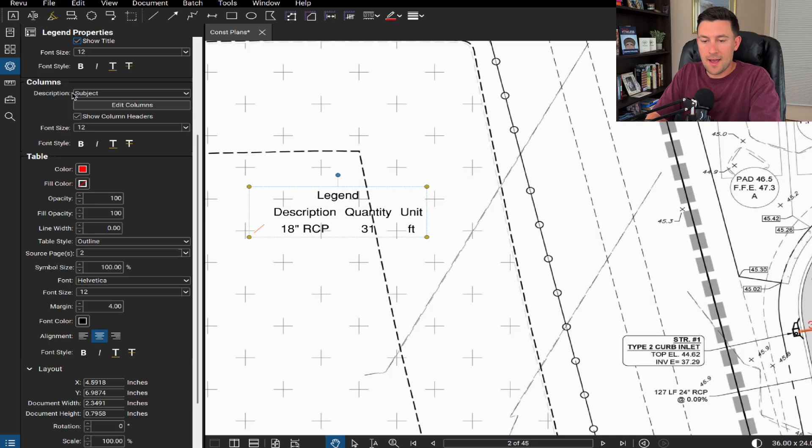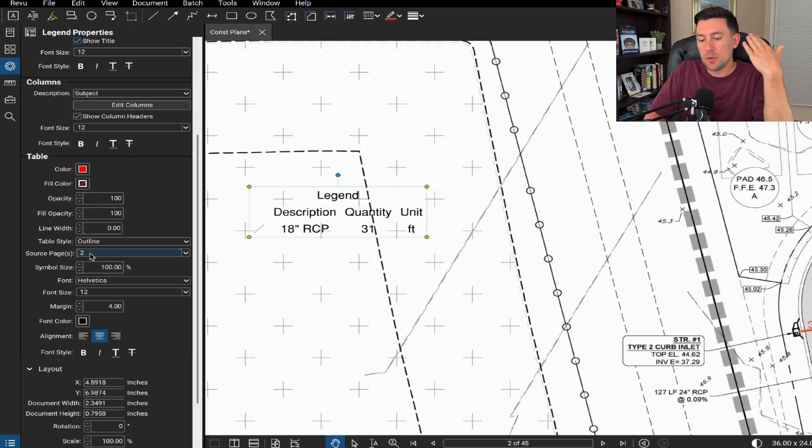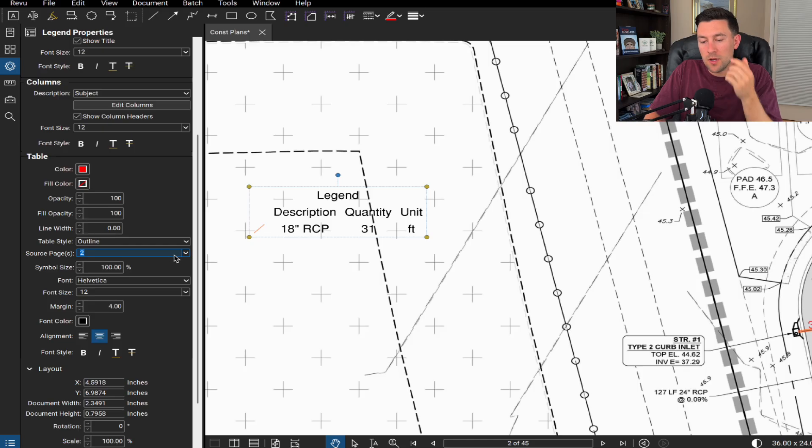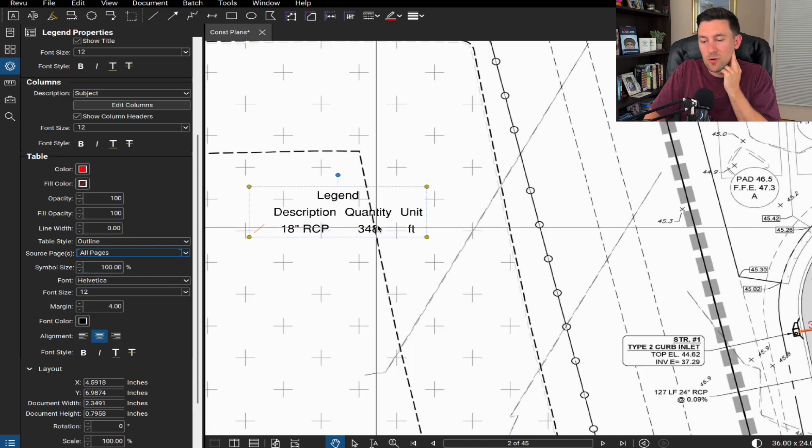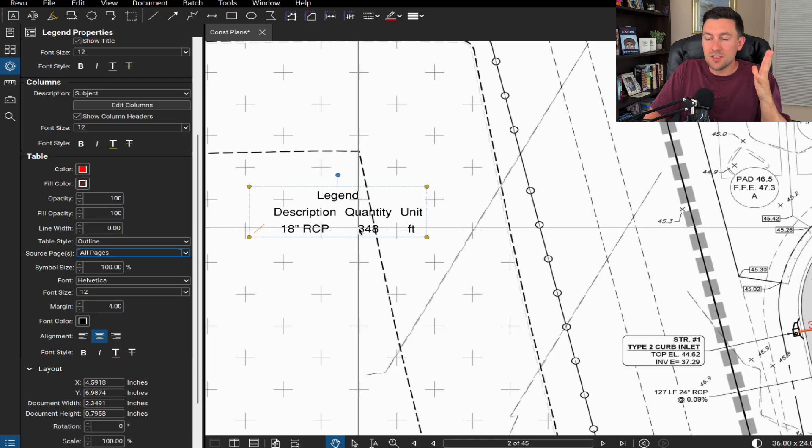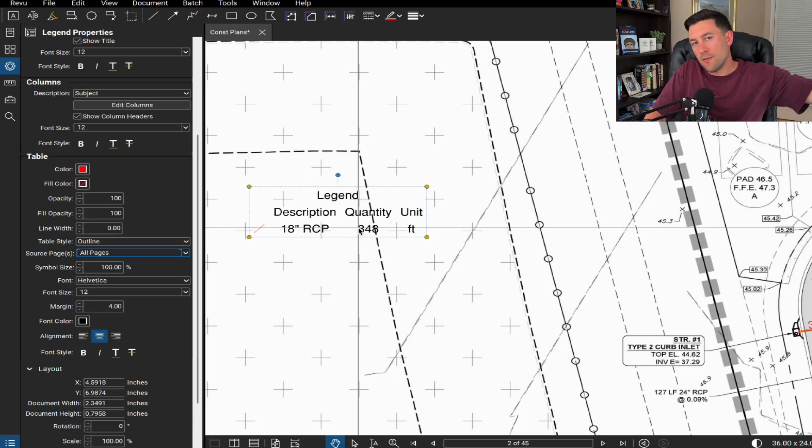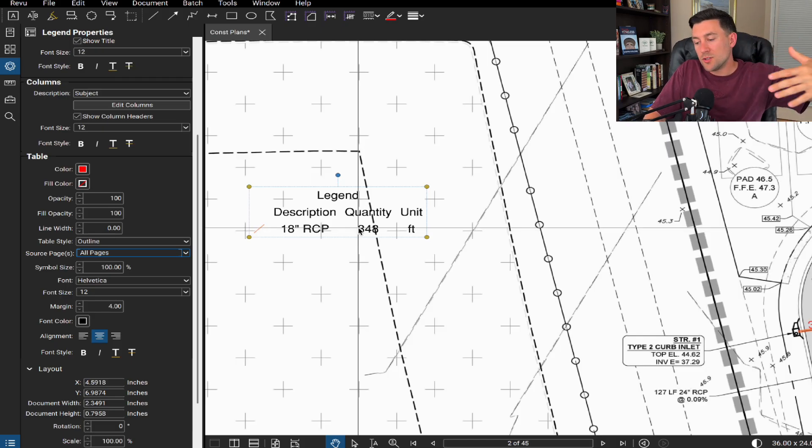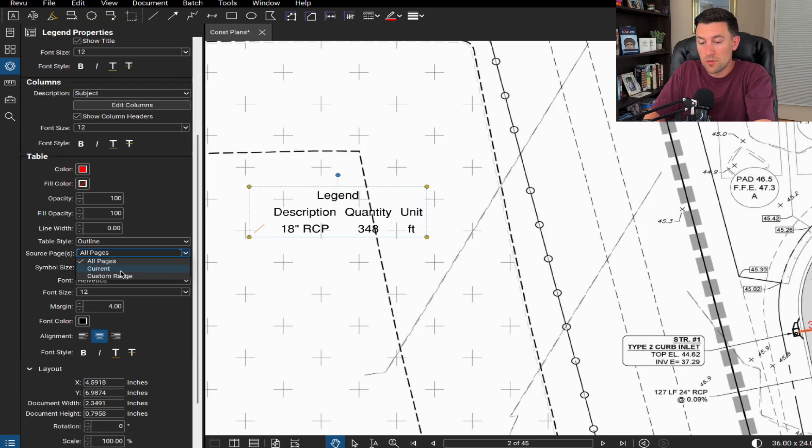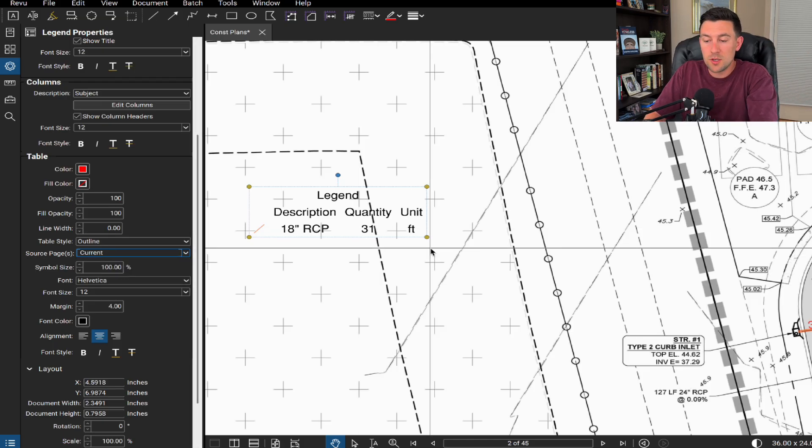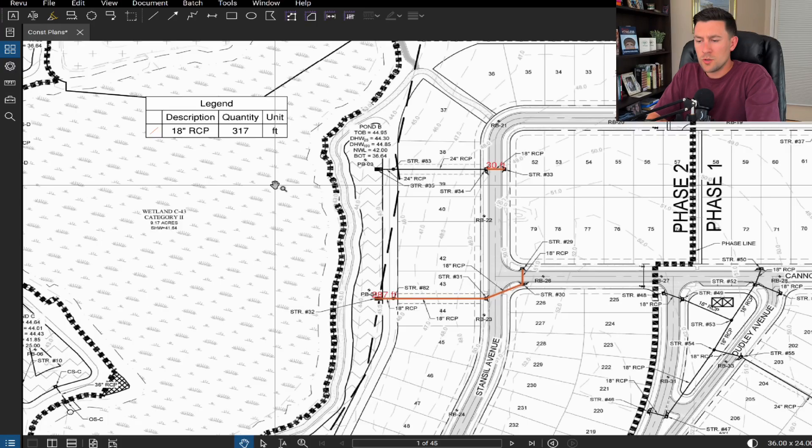So I'm at the properties dialog box right here. This source page is coming just from this page too. But if I were to do all pages, let's see how that updates. You see how that quantity updates. So now this legend is in fact adding up everything. So again, do as you will. I recommend doing it just for the source pages and then you can have one summary table.